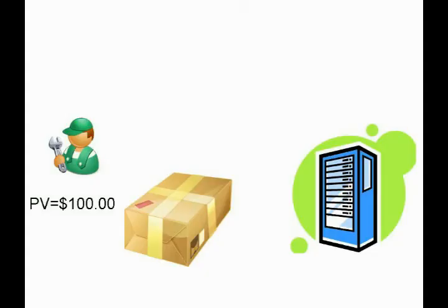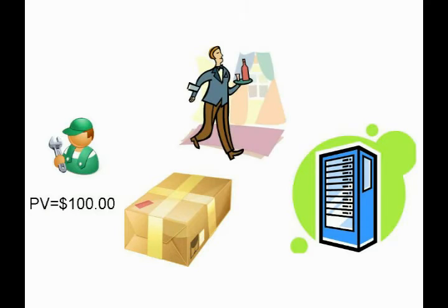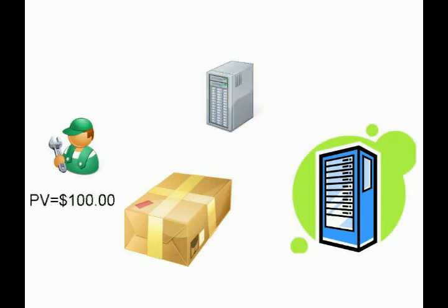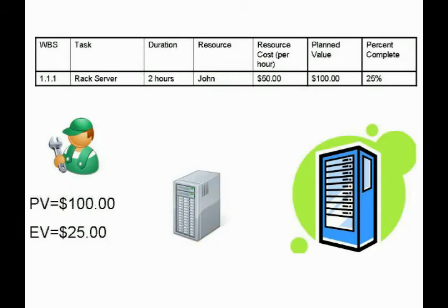Earned value is a representation of the work completed on the task. Our engineer begins the task and at the end of the day reports 25% complete. Since our deliverable has a planned value of $100 and 25% of the work is done, the earned value is $25.